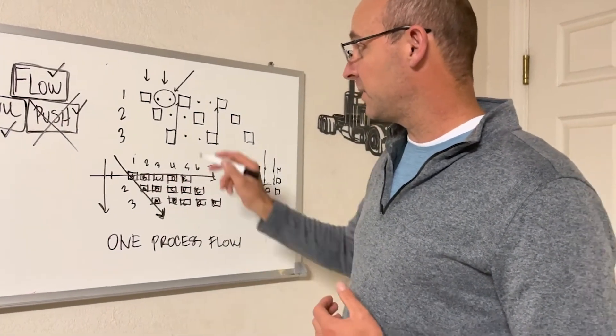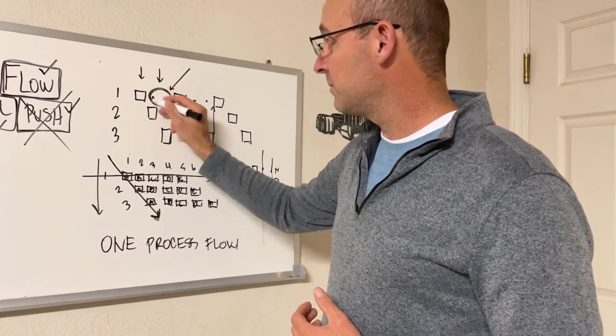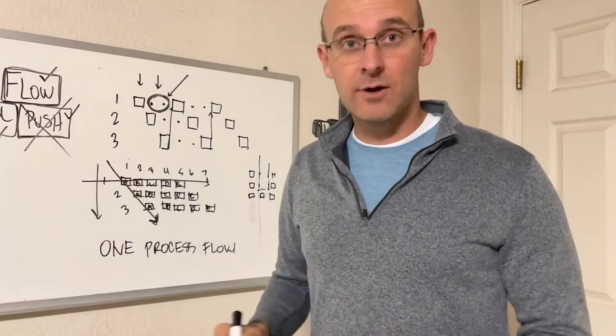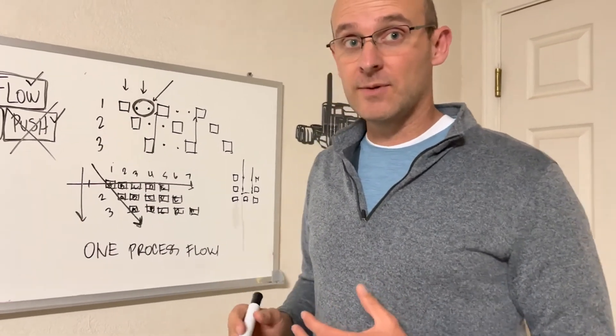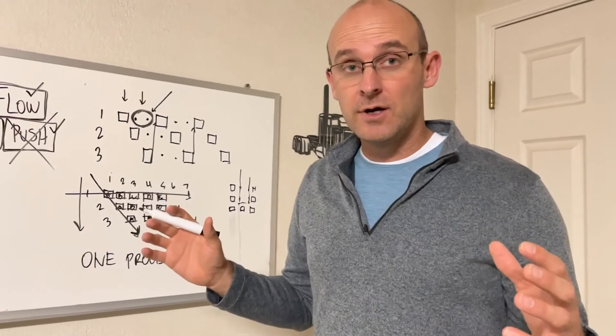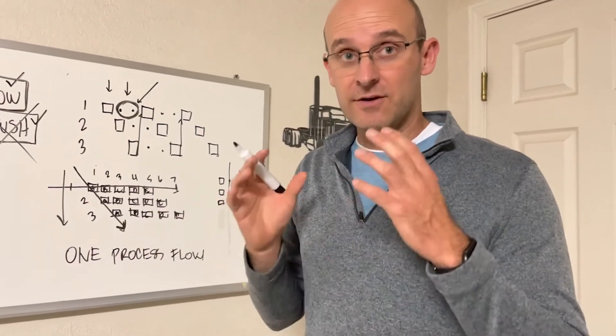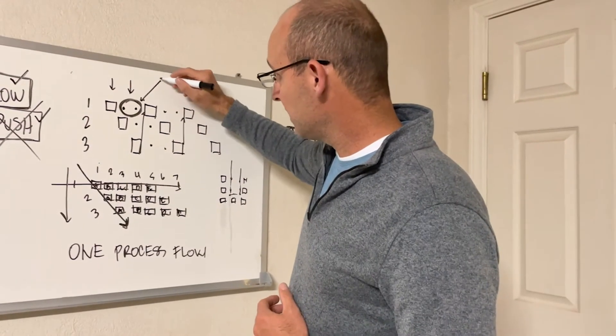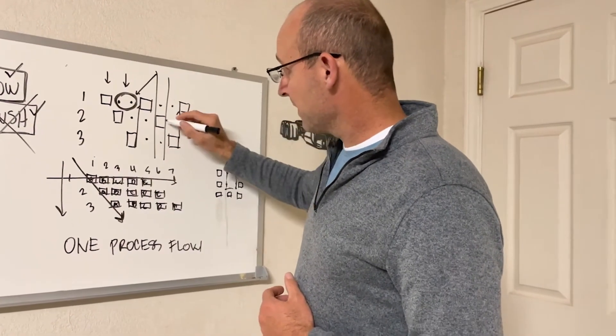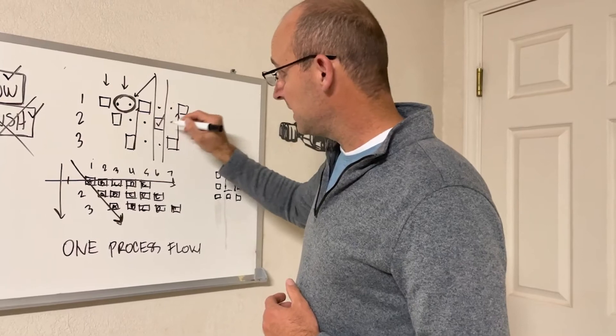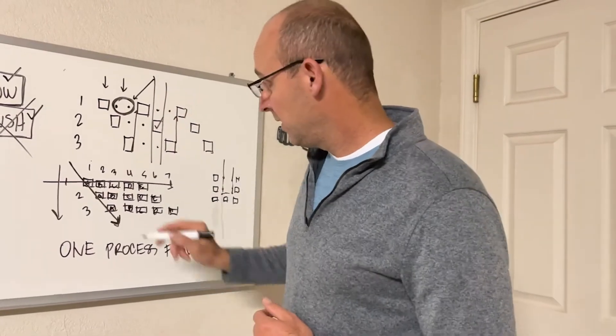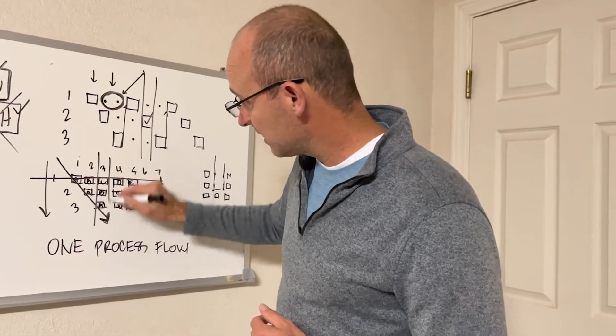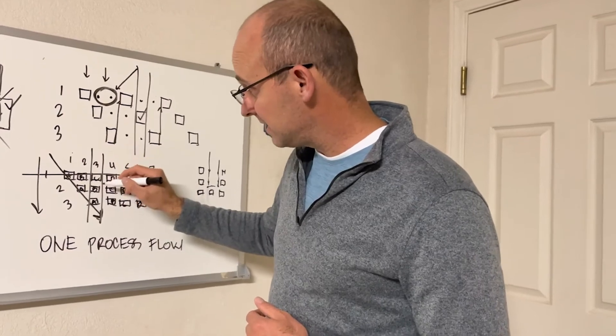When we want flow, we have to have everybody going the same pace, all of these contractors going the same pace. And we can't randomly push people into areas out of flow. The other thing that we have to do is we have to reduce our work in process and focus on the work that we have. So if we're in this day right here, we need to focus on completing that work when we're there.